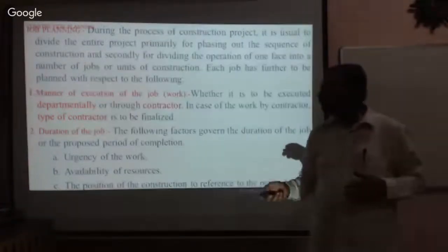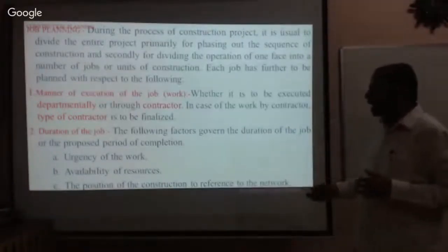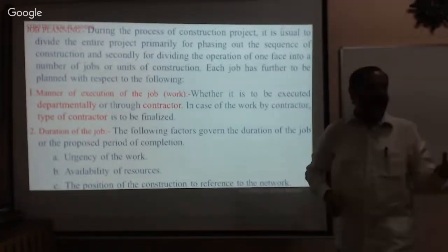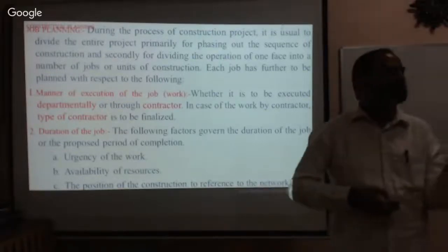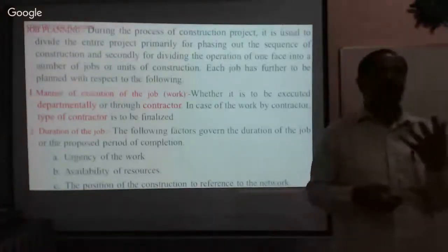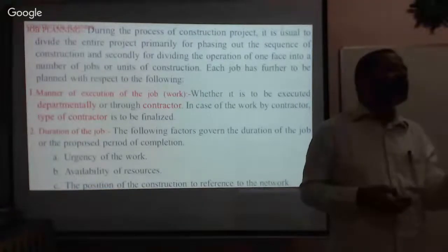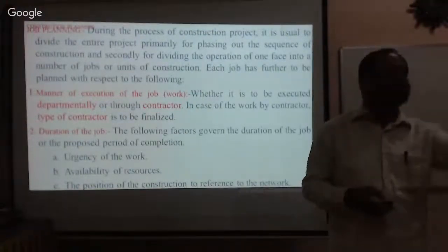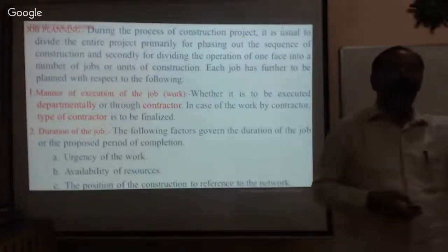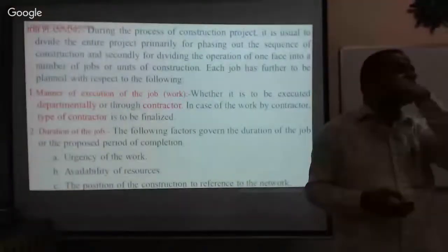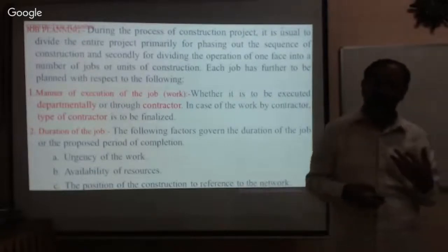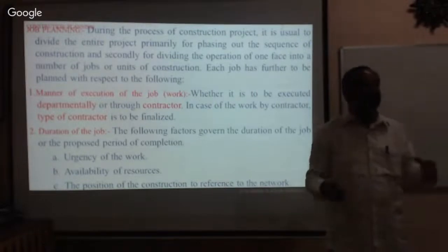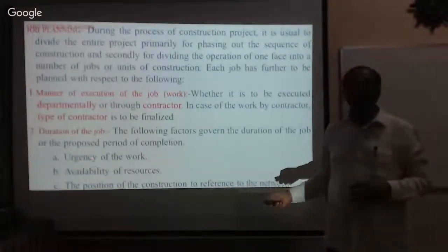Now again, see the urgency of the work. Disasters like rain or earthquake, when some disaster takes place, then we are not following the usual rules. We ask somebody to do it straight away. We can't wait to complete the procedure. It is a difficult task, and by that time many people will die. So for immediate action, urgent, emergency works, we can execute them.